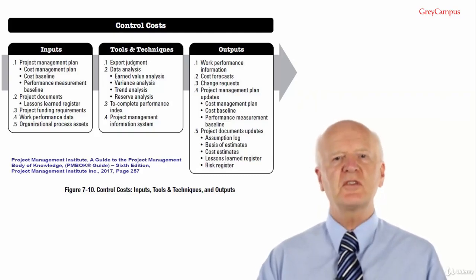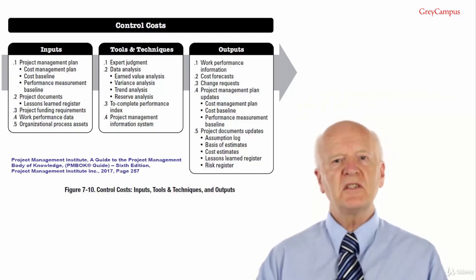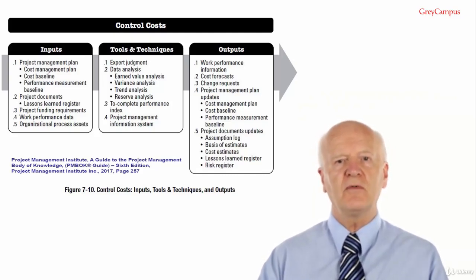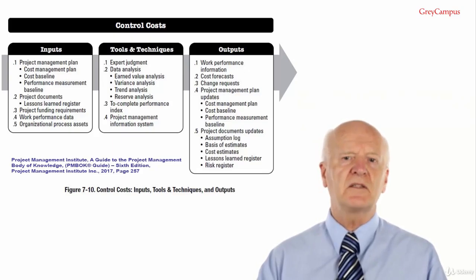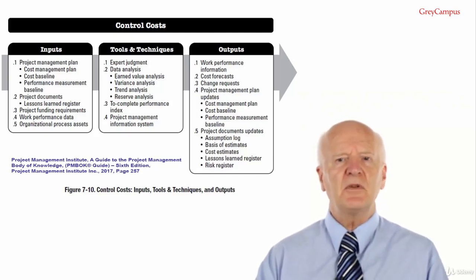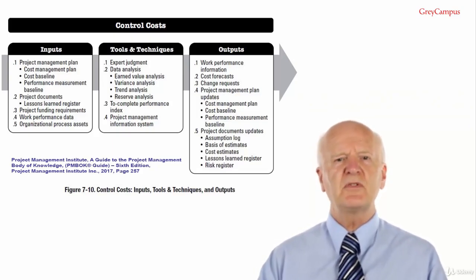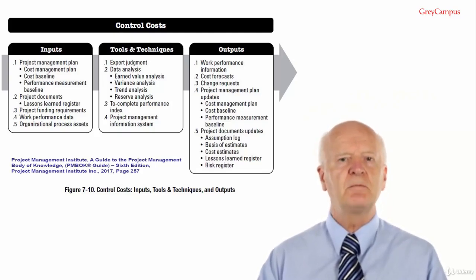Project cost control is not just a matter of passively measuring things. It enables corrective or preventative action to be taken once the variances exceed the percentage range of acceptable variances. Early in the project, you will still largely be in learning mode. The percentage range of acceptable variances are often quite large until the project settles down. However, much later in the project, the percentage range of acceptable variances can be reduced significantly because the project is more predictable and defined, plus of course you've already produced some of the outputs.